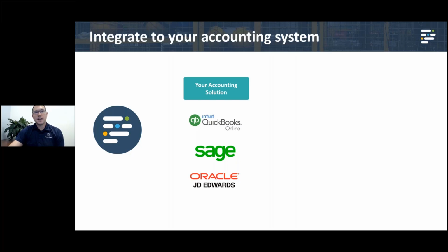In some cases, let's say, like I mentioned in the beginning, I'm tracking my estimates, let's say in Sage. I have all that information, I import that. That's going to give me the account codes that might be on the project, or the budget information that's on the project. That automatically sets up the budget items in ProjectTeam, and then I start to create those commitments or transactions against that information. So the data in your systems, whether that's in ProjectTeam or in your accounting system, can move in both directions, whatever is most appropriate for your use cases. And there might be some areas that you want it to go both ways. Some is starting in your accounting to ProjectTeam, and then same thing, ProjectTeam to the accounting side in some ways as well.